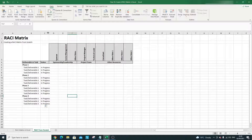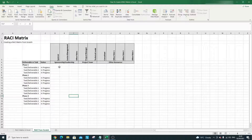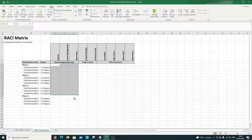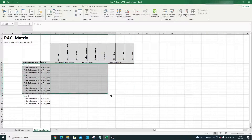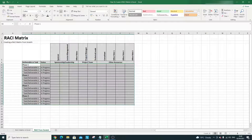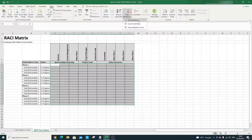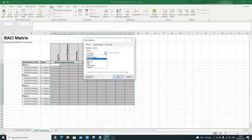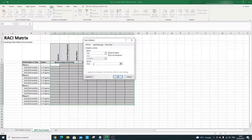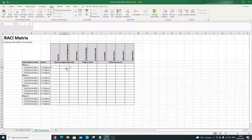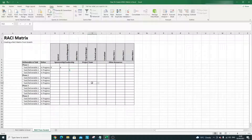Now onto the meat and potatoes of a RACI matrix. Select all the role assignment cells, go to Data, Data Validation, and click Data Validation. Under Allow, choose List, and set the source to R, A, C, I. This enables you to select the different roles for each individual against each task, which is essentially what builds out your RACI matrix once all cells are populated.